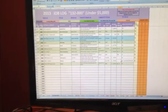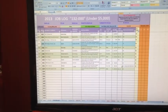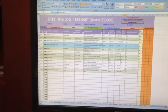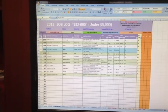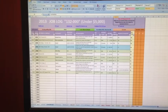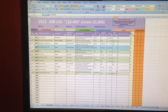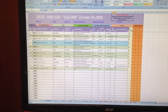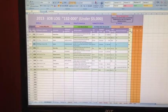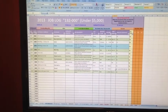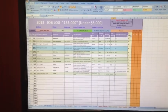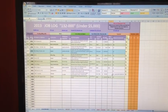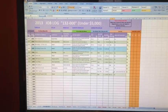In this process, the first step is the PM or the estimator will bid the job, then we get the direction to proceed from the general contractor. From that point on, the project manager or the estimator has to send that information to our accounting department and request a job number.